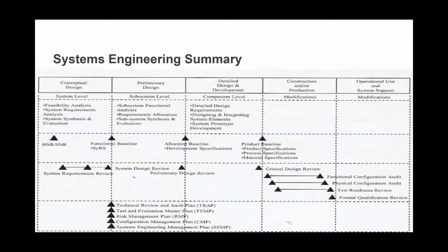We'll touch on how requirements are structured at a later time. So at preliminary design, we've got the allocated baseline, and then at the detailed design or IFC, we have got a product baseline where we know the design is finished, we know how a product will look, and then construction starts, or commissioning starts, or manufacturing starts, and then we get to see the physical layout, the physical elements, or the physical subsystems or system that we designed in our PD, DD and IFC stages.